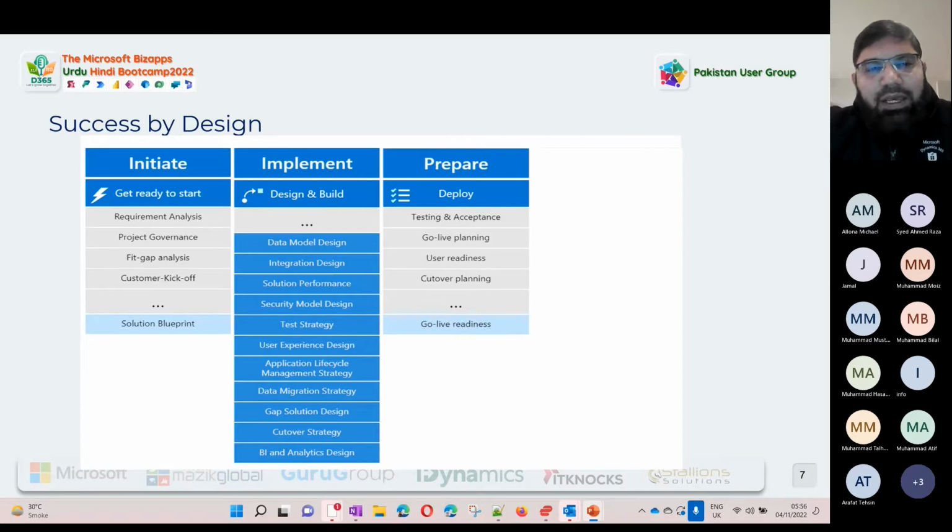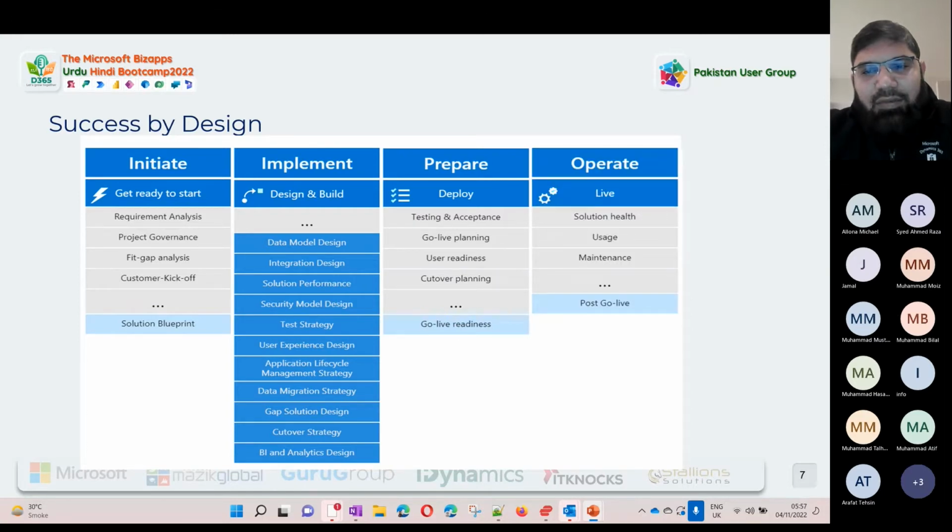Now that the design and the build has commenced and is about to finish, towards the end, the solution architect and the PM get involved with getting the team on the customer side ready, having the SIT started, having the UAT planned, making sure that the UAT success criteria is met, and preparing for the go live scenarios. The solution architect will also work with cutover planning and make sure that within the cutover, the right dependencies are defined. And once the system has gone live, the last operation is: what do we do?